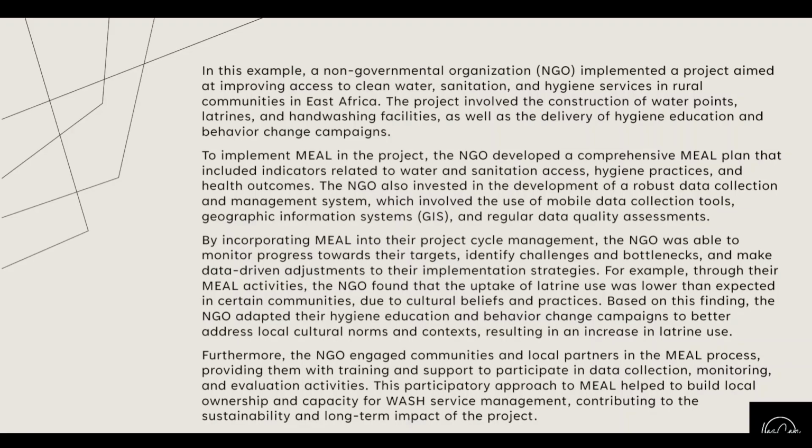For example, through their MEAL activities, the NGO found that the uptake of latrine use was lower than expected in certain communities due to cultural beliefs and practices. Based on this finding, the organization adapted their hygiene education and behavior change campaigns to better address local cultural norms and context, resulting in an increase in latrine use.